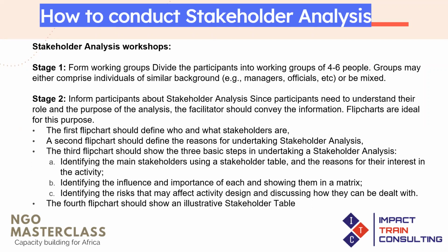And then within the second flip chart, you're going to share the reason why you are conducting the stakeholder analysis. So you want to use flip charts or whiteboard markers and place them strategically so that people can read, see, and understand the reason why they are actually carrying out the stakeholder analysis. Now, in the third flip chart, so you're going to be using 4 flip charts now, you're going to show the 3 basic steps in undertaking a stakeholder analysis, which is, 1, creating a stakeholder table to identify all the stakeholders and what their interests are in the activity.